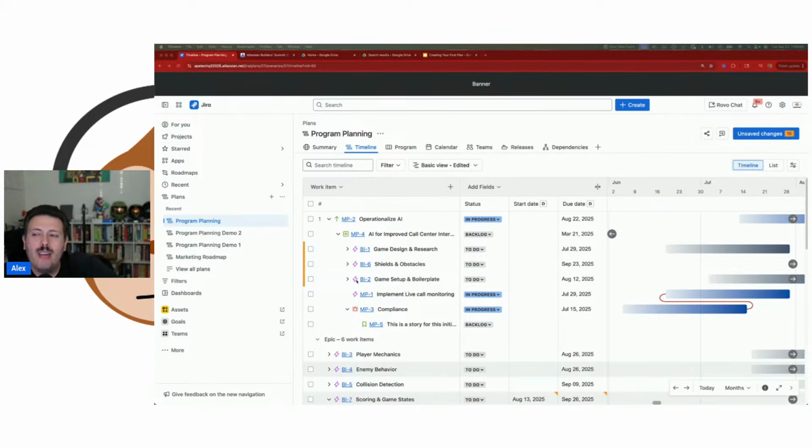And so the scenarios inside the plans are designed to help you visually see those what if scenarios, right? Like what happens if we lose half the team? What happens if we have double the budget, right? What happens if we have half the schedule, right? What if all of a sudden we thought we had 6 months to get the project done, now we only have 3 months? Like, what happens? Because when you go to move the dates, right?